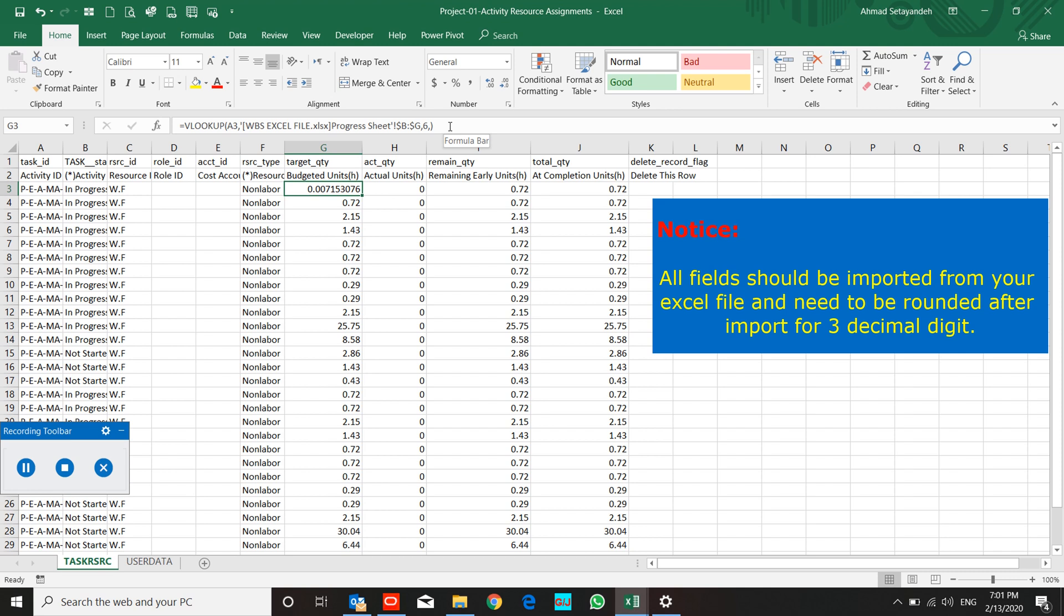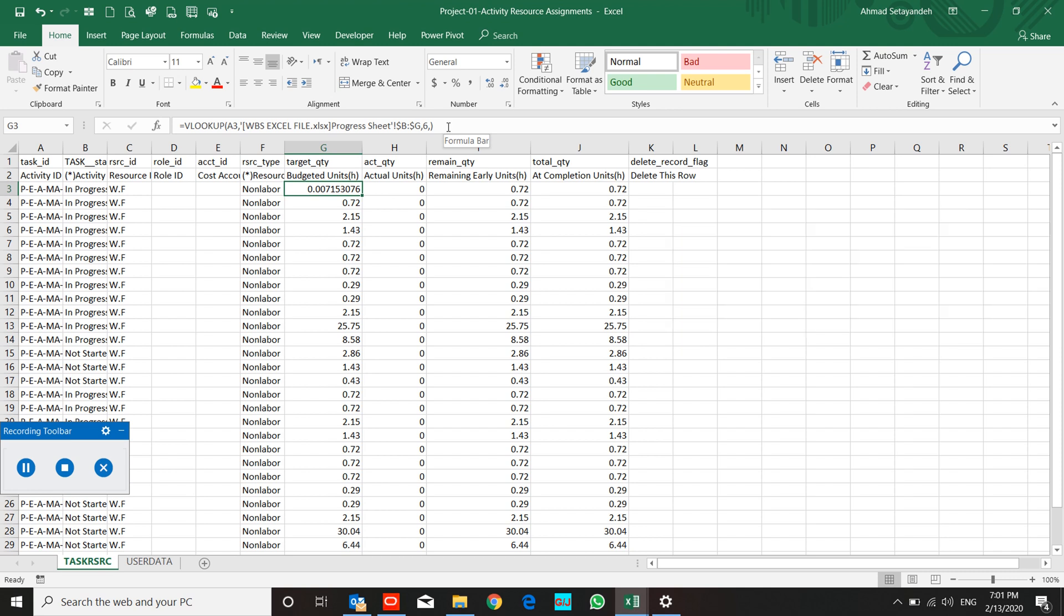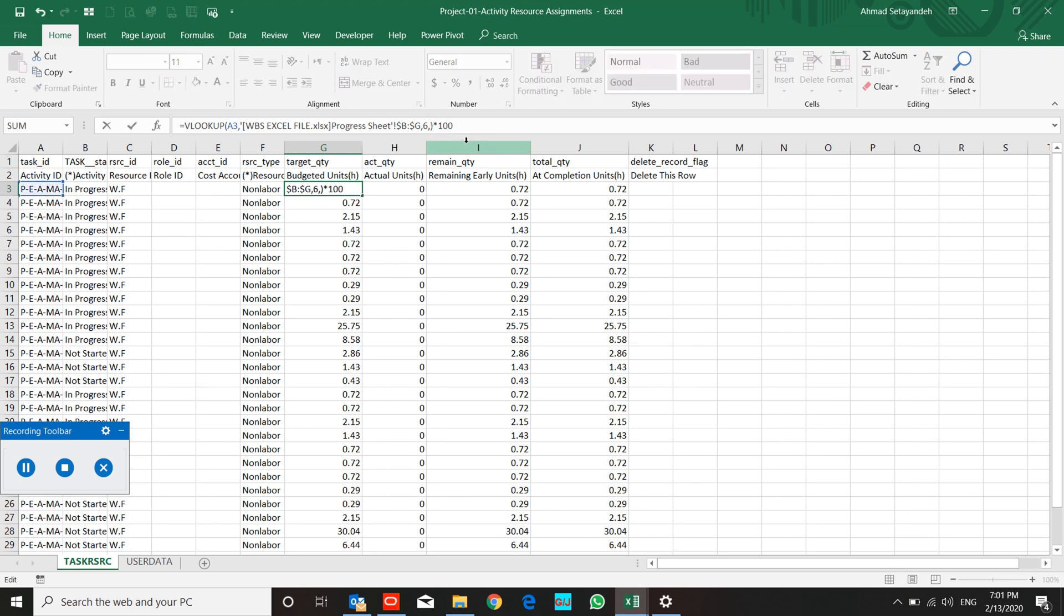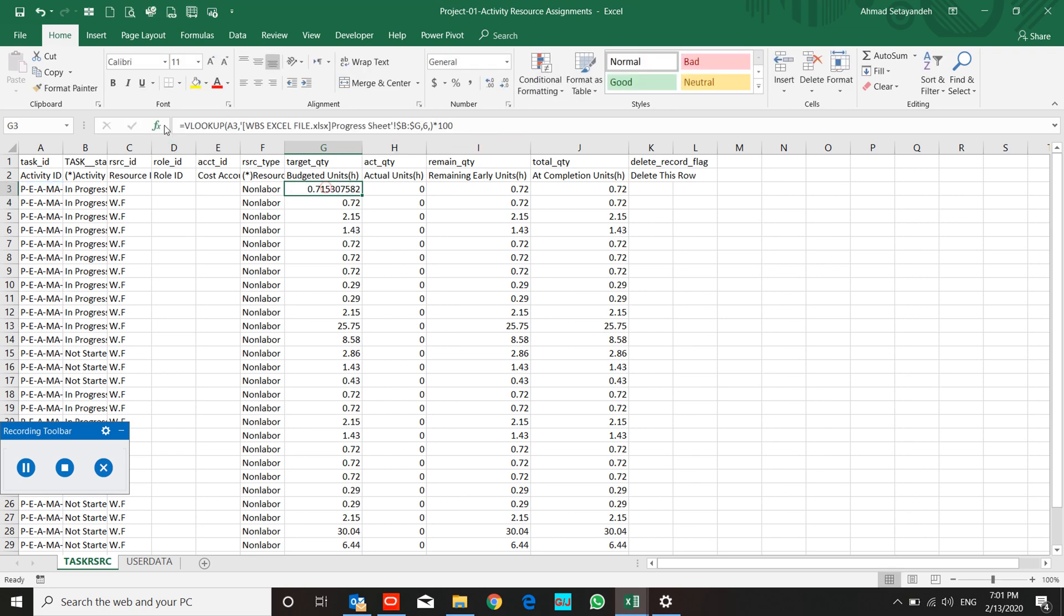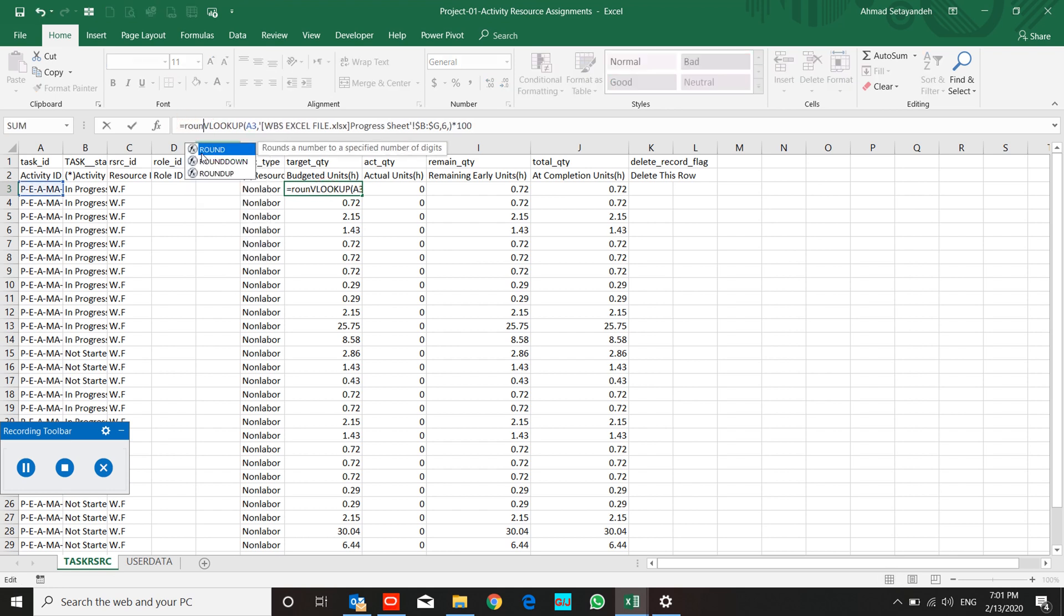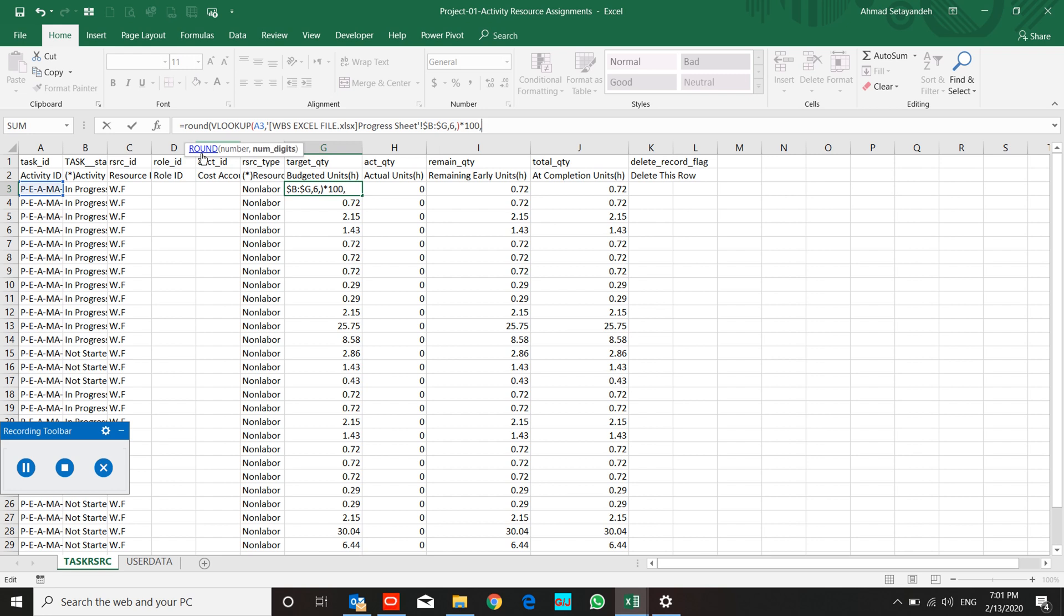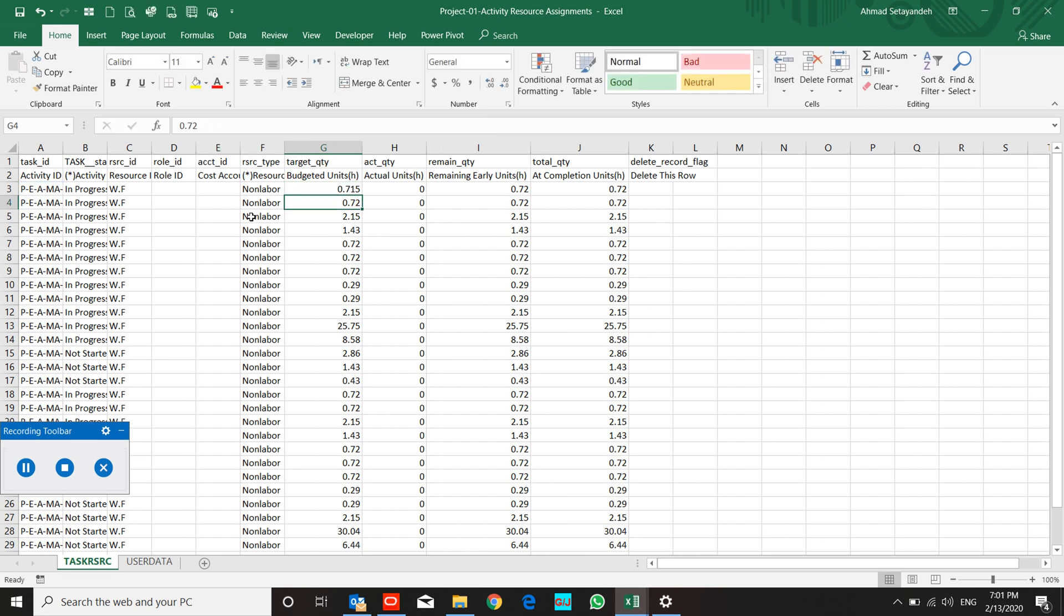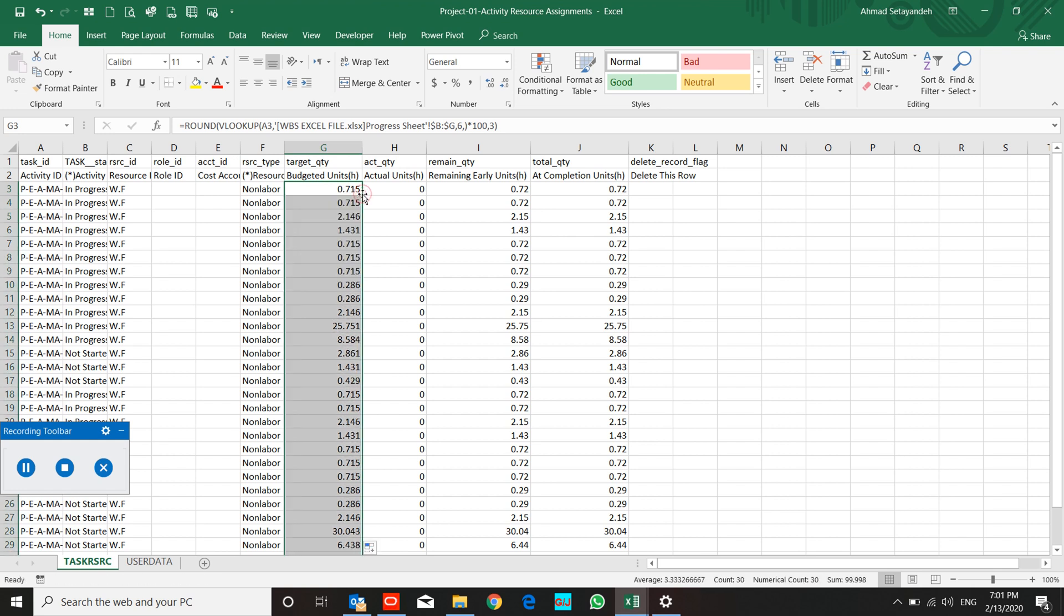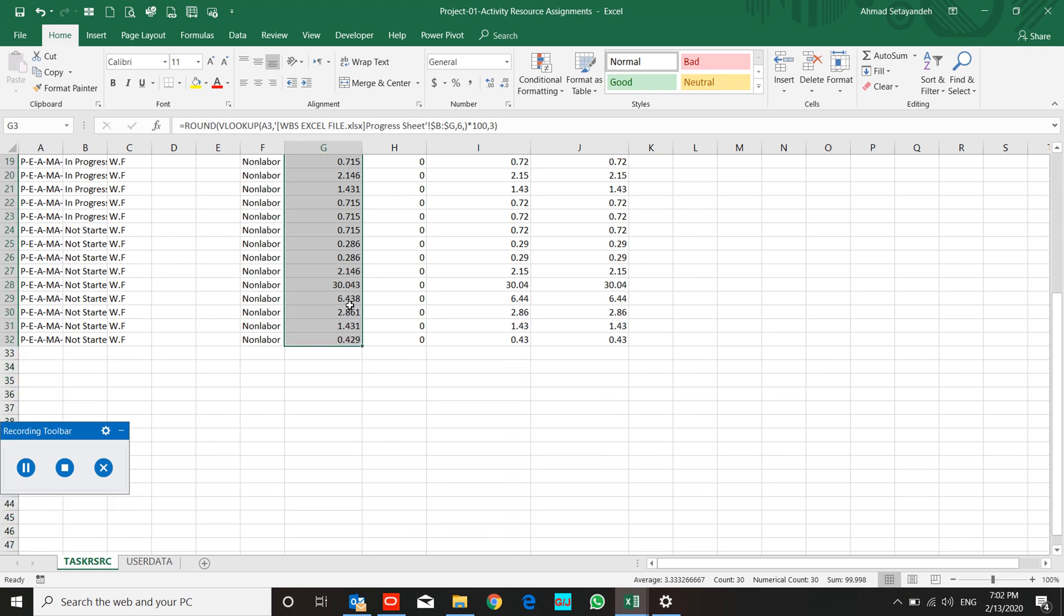Budget unit, multiply it to hundred according to our project assumption and round it to three digits. You know, P6 only has two digits.